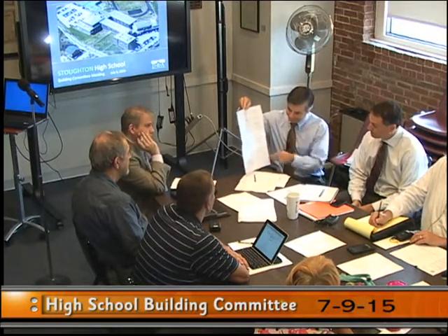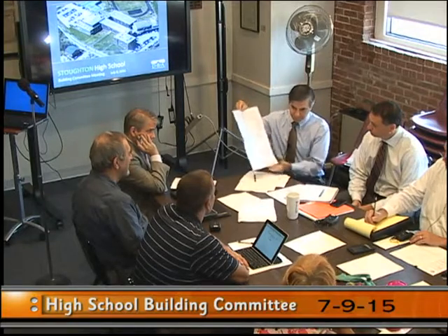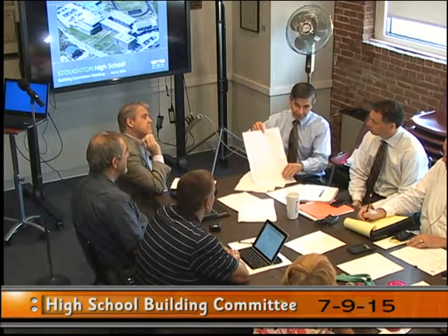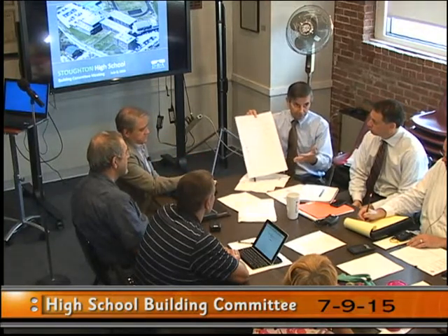Thank you. Maybe just before you leave that, Carl, just point out who needs to sign that when it's completed and approved. Well, ultimately, we sign it as the architect because it has to do with drawing plans, certifying that the size of the building meets the size called for here and the size of the classrooms and all. And since the architect is drawing the plans, we can certify that the rooms are the right size and so forth. So on this form, it's the architect that signs off. On the educational plan, they'll want the district to sign off on that. And that's more the narrative, and we'll talk about that in a minute. In that case, the district can choose whether the school committee needs to endorse it or just the superintendent. But it is the educational portion of the district that has to sign off on the educational plan.